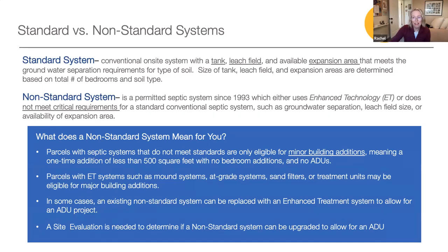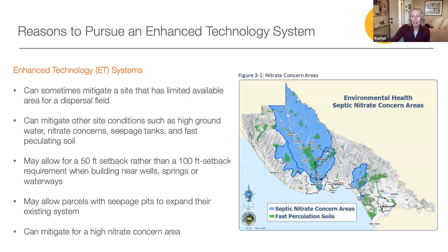In all cases, a site evaluation is needed to determine if the system can be upgraded to allow for a new unit. Enhanced technology systems — also called advanced or enhanced treatment systems — can sometimes mitigate a site that has limited available area for a leach field. They can also mitigate other site conditions such as high groundwater, nitrate concerns, seepage tanks, and fast-percolating soil. They may allow for a 50-foot setback rather than a 100-foot setback when building near wells, springs, and waterways. In all cases, enhanced treatment provides for an expansion of the system to allow for the development of an ADU.